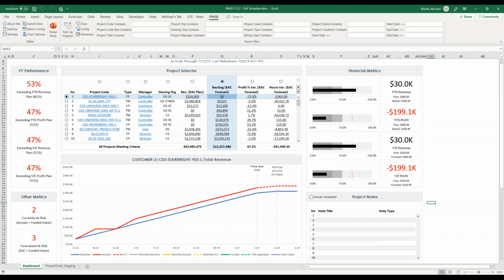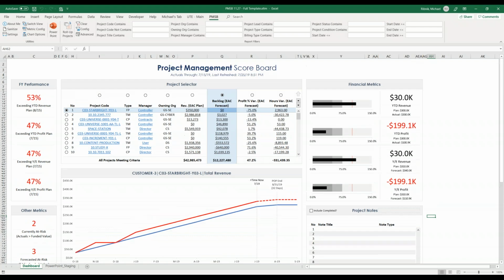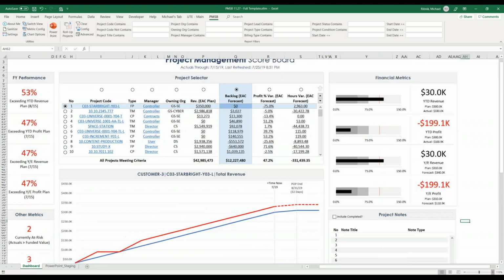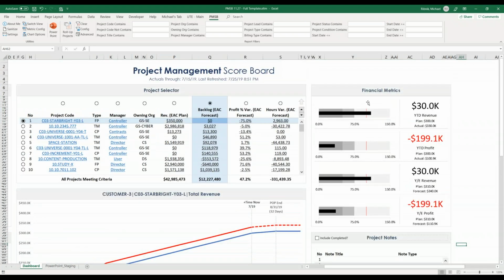And these are a series of charts that visually depict percentage of your targets achieved. So let's go over that. These charts are called bullet charts. The way that they work is that the vertical red line represents your target. That's your plan. And that represents 100% of your target. The black bar going from left to right shows you the percentage that you have achieved.